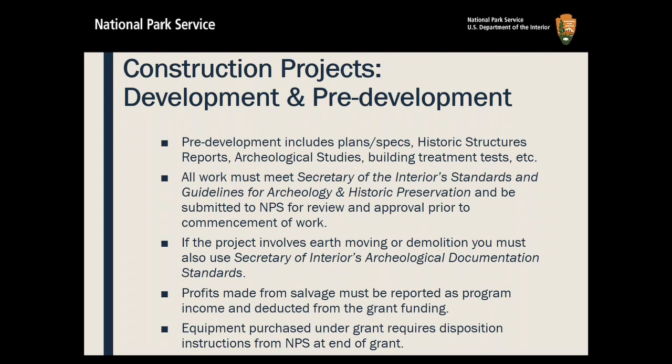Equipment purchased under our grant also requires disposition instructions from us at the end of the grant, and you have to do an inventory. In some cases, equipment makes sense. For instance, if you're doing a large project and purchase makes more financial sense versus rental, we would be open to that. Just talk to your grant manager.